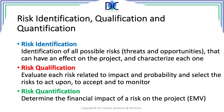Risk qualification is about ordering the risks from high to low importance. Each risk has an impact score and a probability of occurrence. All identified risks can be located in the probability and impact matrix, where we can identify three different zones. Risks with high impact and high probability will be in the top zone and these are the risks that we will have to develop risk plans for. Risks with low impact and probability are in the lower zone and we will just accept these — we will not prepare any plans for these types of risks. Between the two zones there is a zone of risks with medium impact and probability. These risks can become important depending on the evolution of the project, so it is important that we monitor their behavior and adjust the risk plans when necessary.